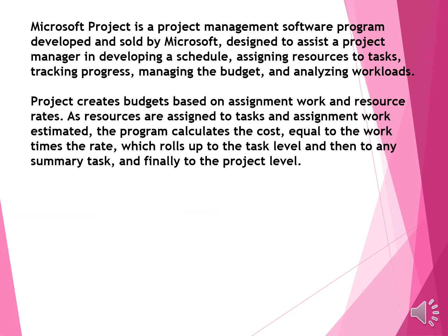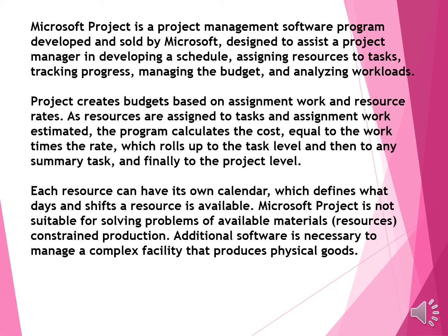As resources are assigned to tasks and assignment work is estimated, the program calculates the cost equal to the work times the rate, which rolls up to the task level and then to any summary task and finally to the project level. Each resource can have its own calendar, which defines what days and shifts a resource is available.